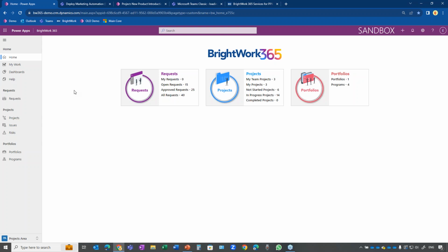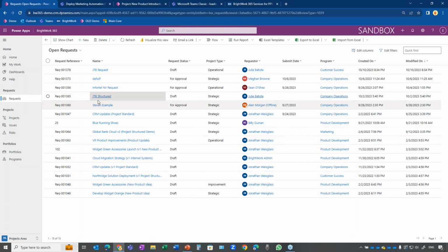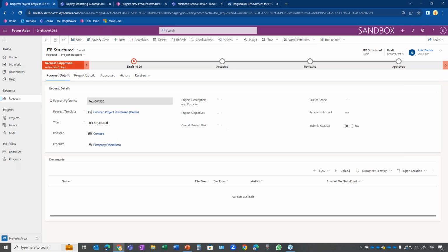So one thing you might do is you might decide to add project request management. So what that would do is that would say, well, listen, instead of just starting projects as we wish, we'd put them through a governance process. So we get the right information to the right people so they can decide, does this project start now or later, or maybe not at all, or with whatever resources.